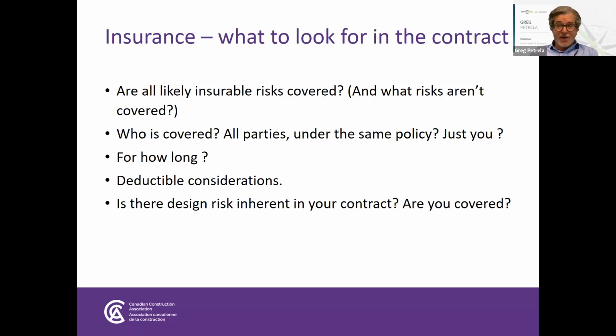You go to the contract again, and it's a good question. I know the theme of this series of sessions is really about understanding your contract and the insurance provisions in the contract. It should be there. So we need to look at the prime contract. If people are familiar with the CCDC 41, it's a series of technical insurance specifications that most construction contracts will refer to, including the CCDC 2, the 5, the construction management contracts, and I think even the CCDC 14, the design build, also refers to CCDC 41.